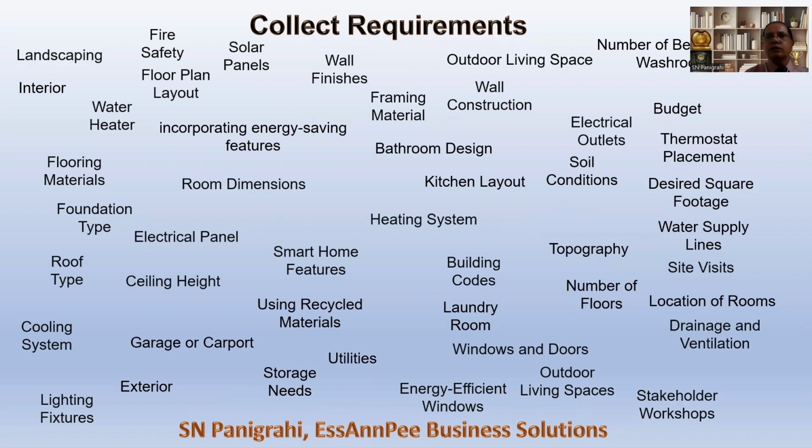We collect the requirements through brainstorming, interviews, observations or surveys, and various other means, and through expert judgment also, meaning subject matter experts like architects and engineers. Once we have collected all the requirements, we have to make a proper grouping, because with scattered requirements it is very difficult to make a proper plan and define the scope. So all the requirements are now grouped or categorized.